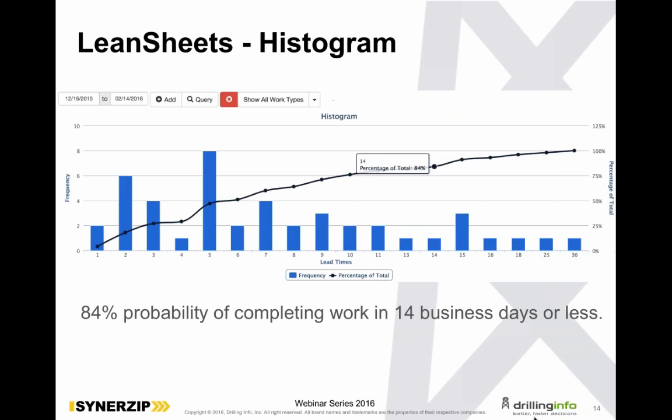So if I go back to this histogram chart, I can tell a team that it's going to be 14 days with roughly 85% confidence, or 85% probability, that you're going to get it in that amount of time. So there's roughly a 15% chance that they're not going to get it in 14 business days. And what that allows them to do, if they have a piece of work that's dependent on something that my team needs to do, is not start it until probably 14 or 10 business days, 2 weeks out, after we start our work in order to not get blocked.